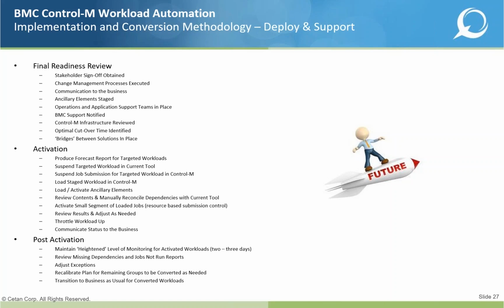Final readiness review also makes sure that, from our perspective, if we feel that the organization isn't ready, maybe that they haven't invested in training, they haven't spent the time getting the right sign-off from the right stakeholders, this is a time where we will raise our hand as well and notify the management team. Sometimes we've had to do that, and we've taken a pause and gone back and addressed those things that concerned us. In other cases, for a variety of business reasons, there just wasn't the opportunity for our client to extend the window. Maybe they had a license that was going to expire and they just had to get it done. And we move forward together, but everyone with the knowledge that we still need to go back and revisit some of those items of concern.